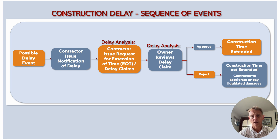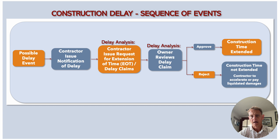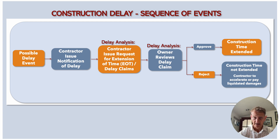The contractor would then need to submit a formal delay claim or extension of time claim. In this delay claim, the contractor needs to analyze the delay and determine the impact and extent of the impact on completion. This claim is submitted to the owner, who would also conduct delay analysis — reviewing the claim and establishing whether the delay event impacted completion and to what extent. If the delay claim is approved, the construction time would be extended. If it's rejected, the construction completion date remains the same and the contractor would have to accelerate the work or face the risk of paying liquidated damages.